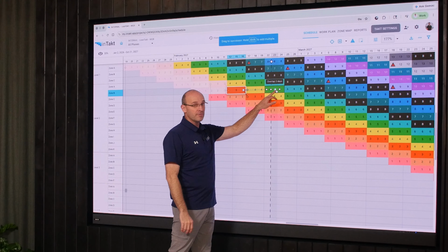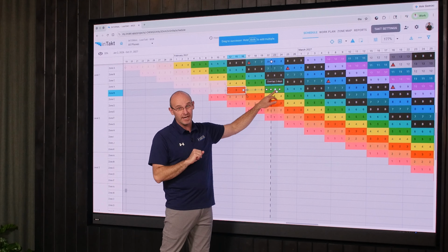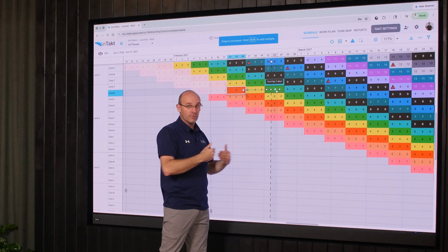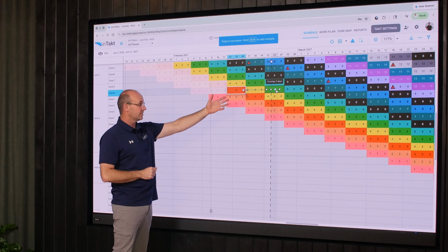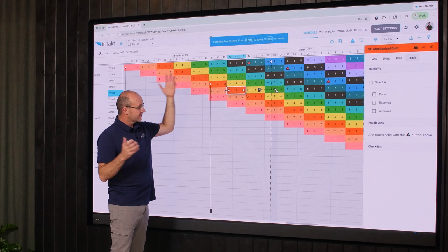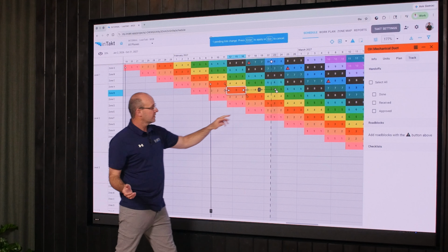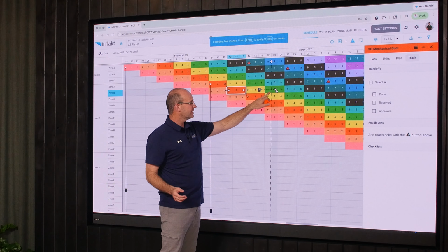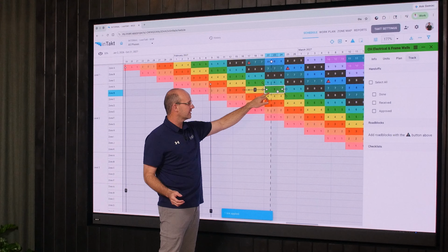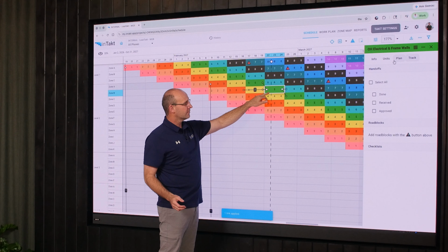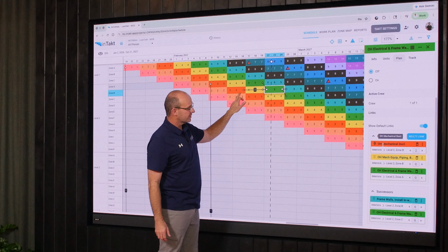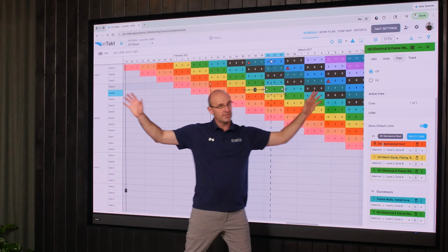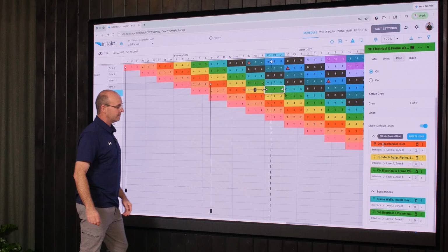You very much want to be able to tie to a portion of, or an intermediate point within, the actual task itself. So Danny can just let go, and it's logic tied. Now if you click on that and go to task properties, if Danny clicks on this activity and goes over here to plan and then scrolls down, you can see that those logic ties are active right here. So it's genius, and that's going to export to your CPM.